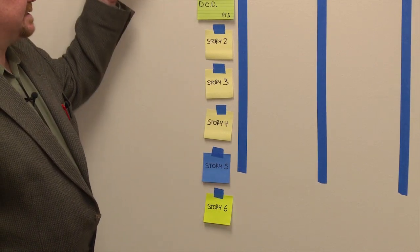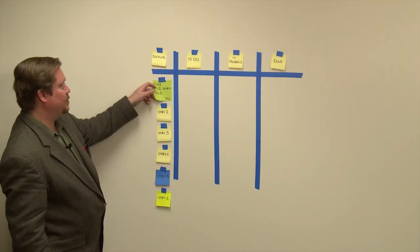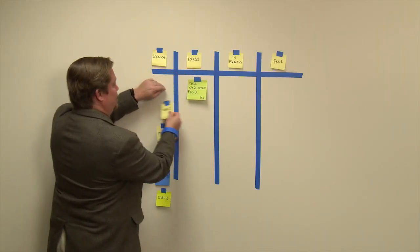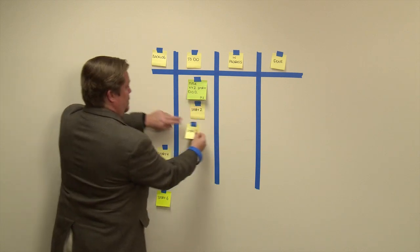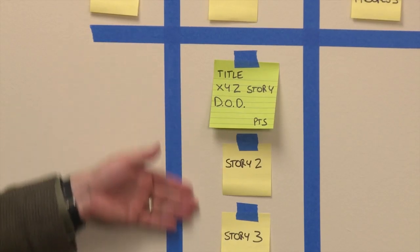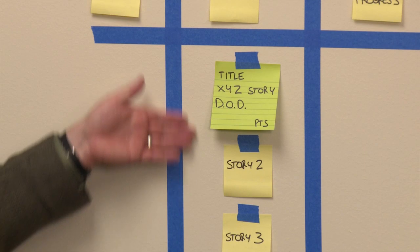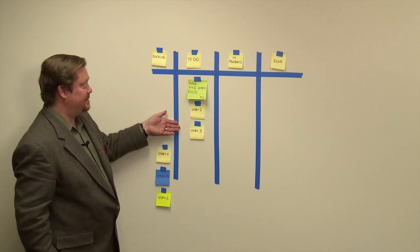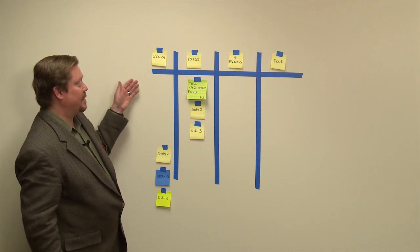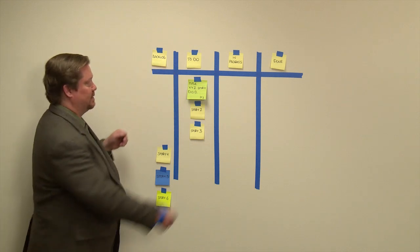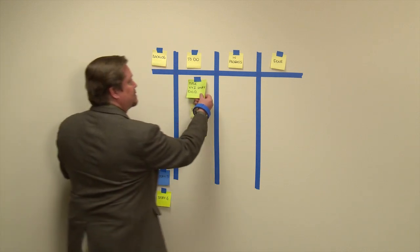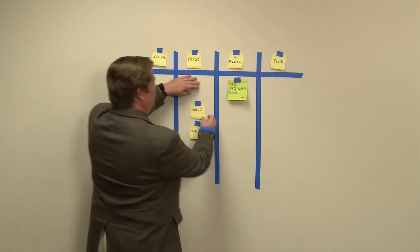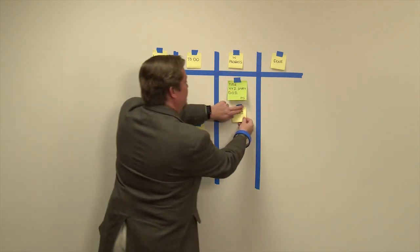As you plan as a team, you take items and you put them into the to-do state. These stories here might represent your sprint backlog. Every day during your daily stand-up, the team gets together in front of the board and they take work and move it through the different states. So now that we start working on this story, it gets pulled over. As this story gets worked on, it gets pulled over.